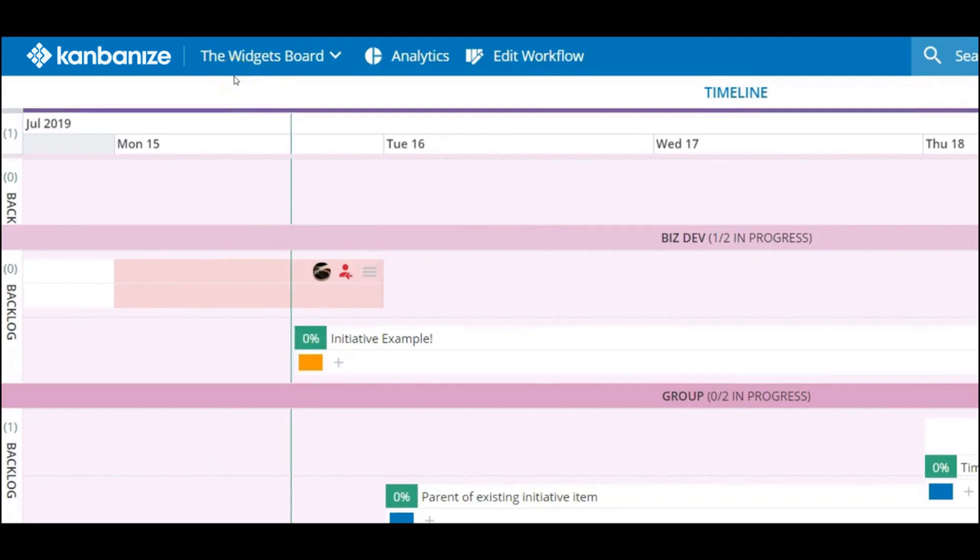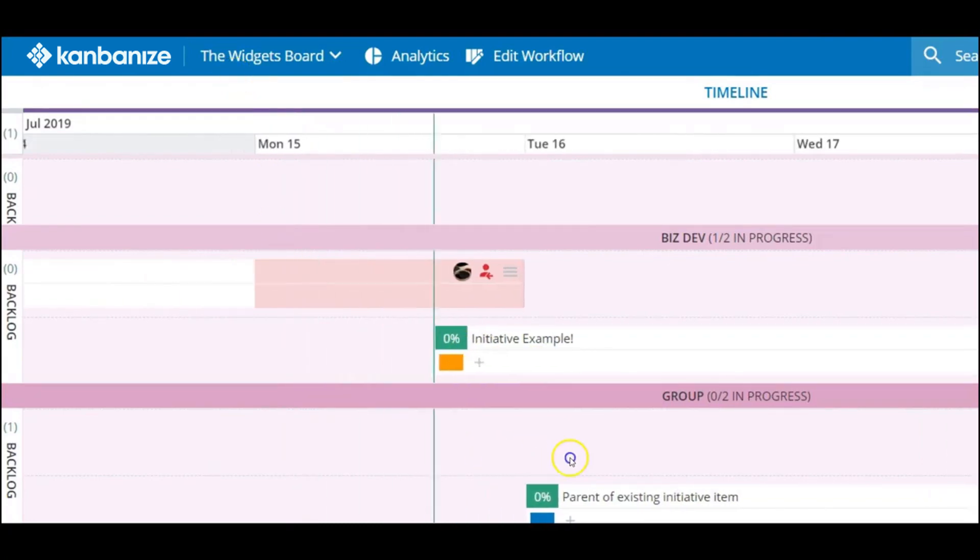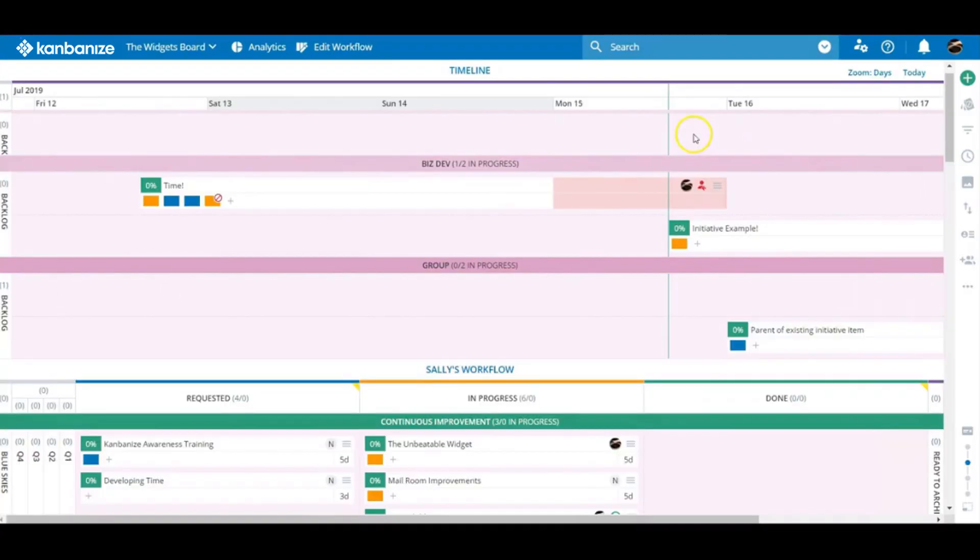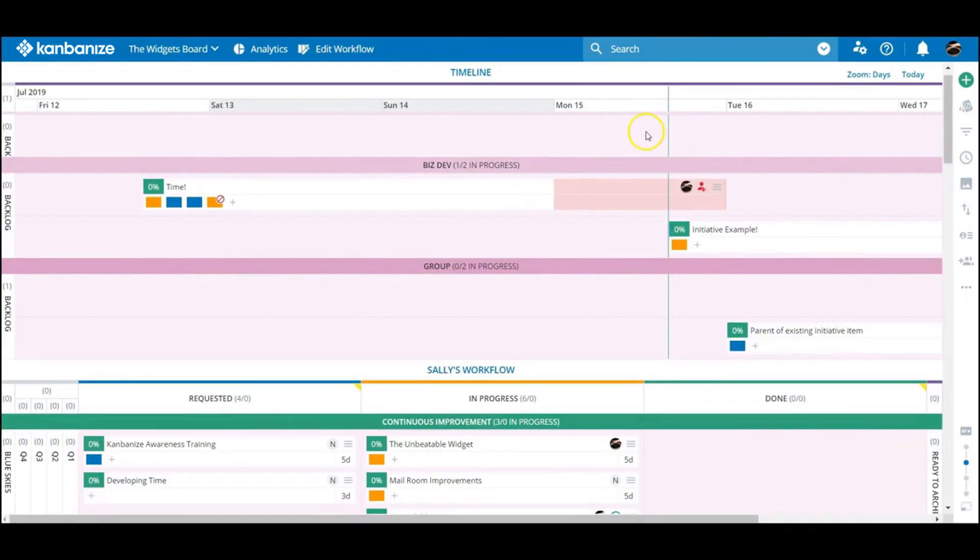If by any chance a scheduled end date is missed, the initiative will highlight this by coloring itself dark pink. Kanban cards can blush. This is a very new feature.